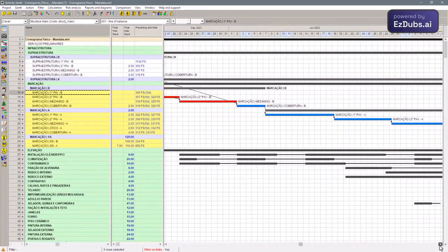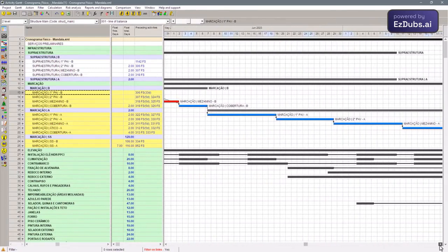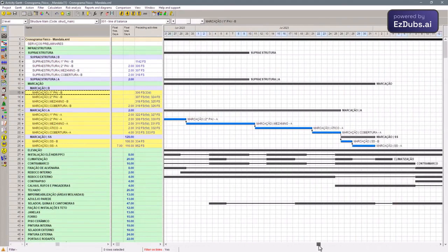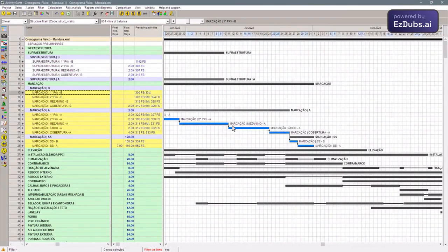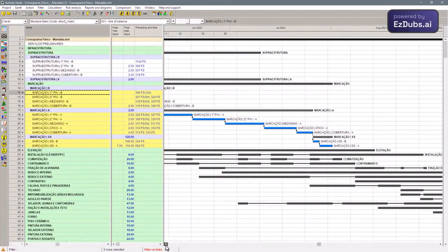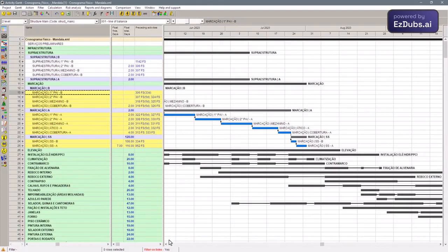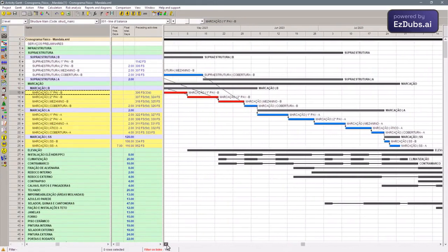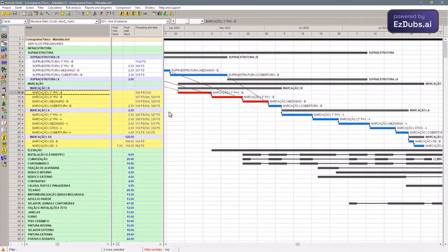What we achieve in this tool, in the same way, is to eliminate possible idleness or useless stops. So we balance this production line. Not that it is a straight line, a drawn line. Here the reference is production line, production front, production branch. And this reasoning extends to all activities, or all repetitive activities, that were classified here in the program.